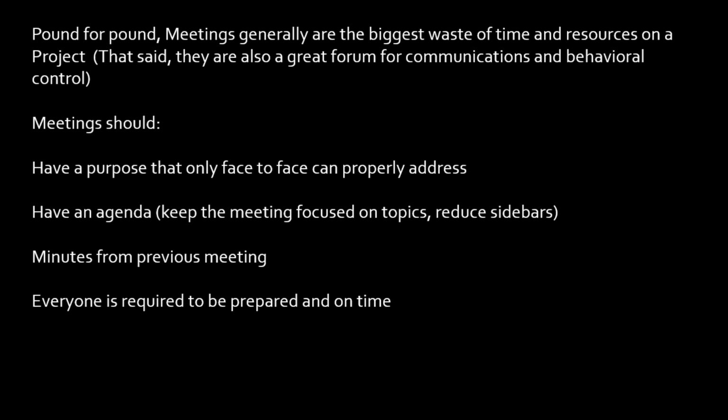Taking minutes also gives you a place to pick up where you left off from the last meeting, because if you're a good, effective project manager, you've been asking questions and following things. Remember things like your risk register that you're constantly looking at. So every meeting, I want to know what's new. What's new in the world of risks?